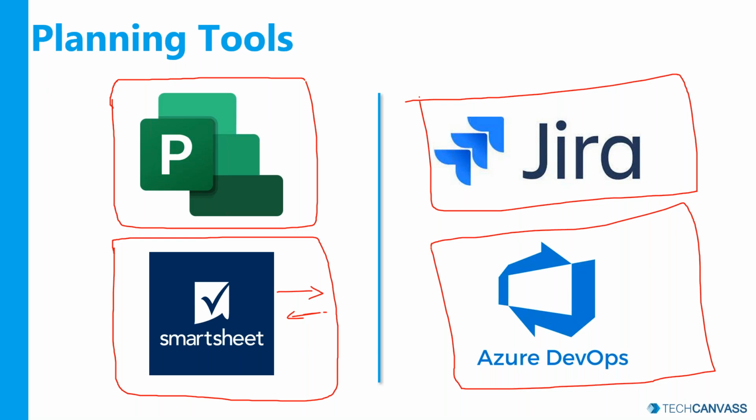For agile projects, Jira and Azure DevOps, both of them are good in roadmap planning and planning for your iterations, tracking releases, mapping releases against deliverables, and both of them come with plugins for you to automate your testing. But again, we're talking about planning only here, so both the tools are equally good. In fact, Azure DevOps has a good feature for you to track the load of the users when you're doing sprint planning. Capacity of the users can be predefined, and then you do sprint planning according to the capacity of the team members. So these are some examples.